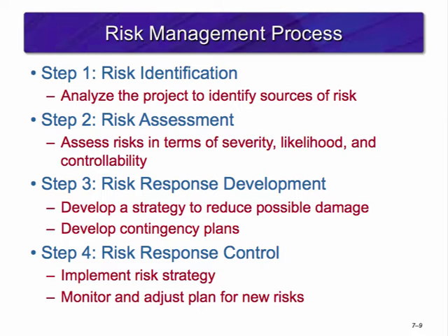The third step is to develop a risk response. The risk response provides a strategy to reduce possible damage and a contingency plan. The last step is to control the risk response. Here, you'll implement your risk strategy and monitor and adjust the plan for new risks.